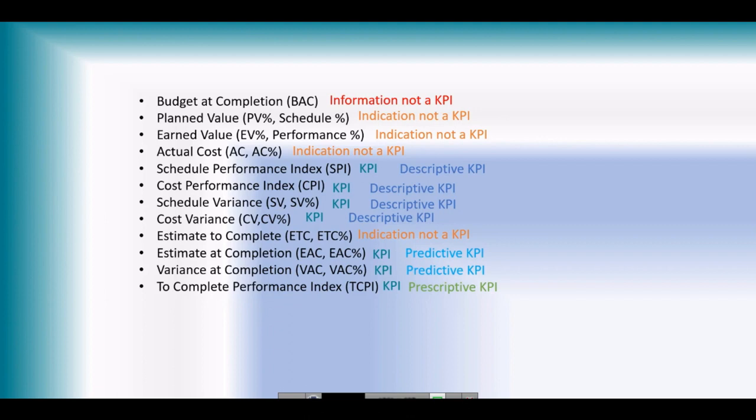So then we will be setting our goals to prescribe for the betterment of the project. That is basically the concept: why we need dashboards, what type of dashboards we need, what type of reports we need. We will set the criteria, because criteria is a subjective thing. Anybody can set any criteria. For some projects, let's say 6% profit is the criteria to prescribe control of the project. So we need to always keep in mind that whatever is happening, we need to bring the project to 6% profit. It also depends whether you have included your profit in the calculation or not, whether you are using the cost baseline or the price baseline which you have sent to the client.